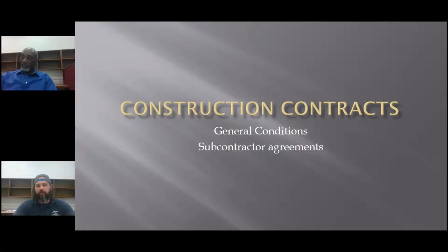So I usually would have a date of the proposal. I have the scope of work and what kind of metal panel we're putting on the wall, what kind of framing is going in, what kind of roof the building is going to have. Then it gets down into payment terms and standardized general conditions. But all of that can be on a simple, small 2-page document that has my signature and my customer's signature on it.